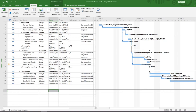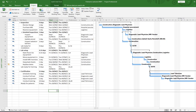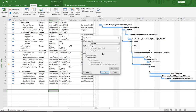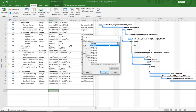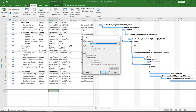Once stakeholders have approved your project plan, you need to save the approved schedule so you can compare actual progress with what has been planned. A project baseline holds a snapshot of the approved schedule. To save a baseline, go up to the Project tab, then in the Schedule section click on Set Baseline from the drop-down menu. A dialog pops up — by default it says 'Baseline', and you can actually set up to 11 different baselines, but we're just going to select a normal baseline for now.